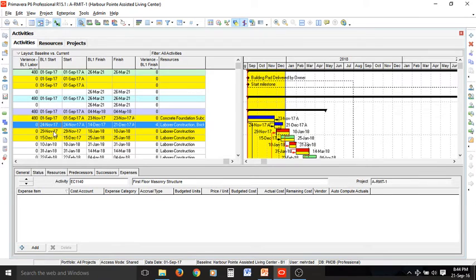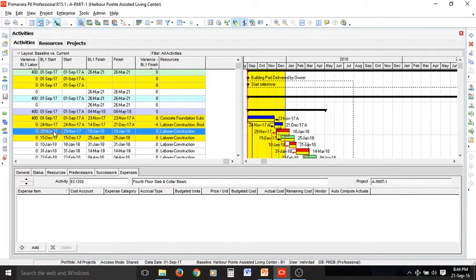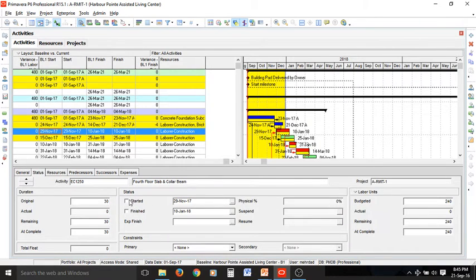The next activity is in the gray area — half of it is highlighted and half is to the right of the data date. So it has been started but not finished yet. You should define this in the status tab by selecting started but not finished yet.